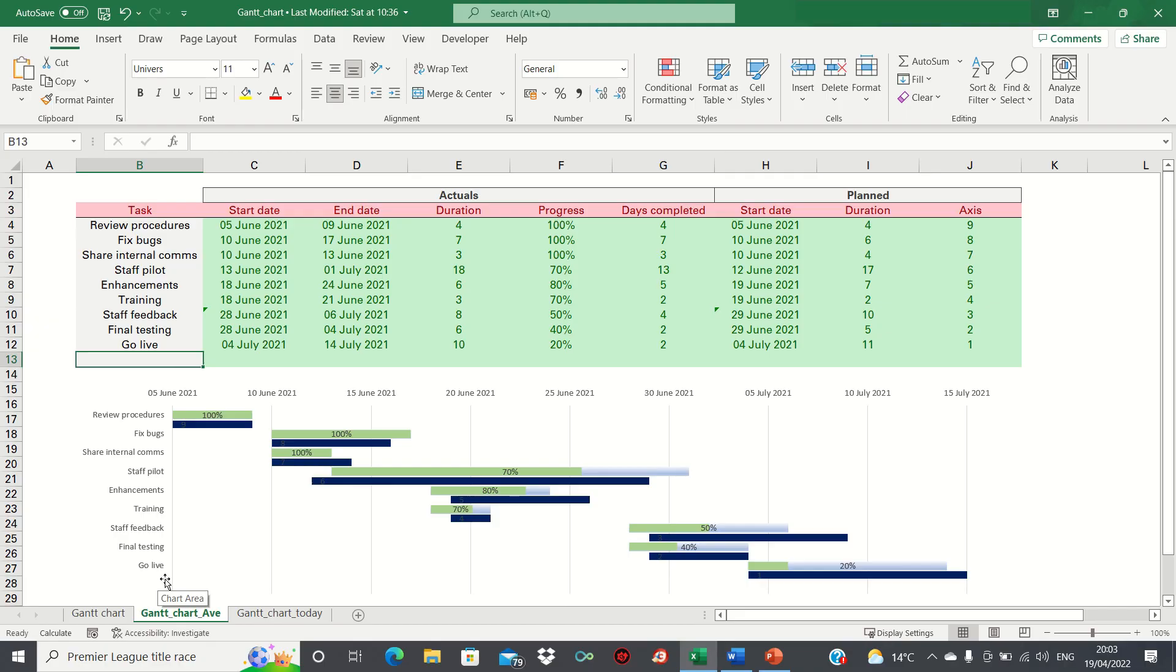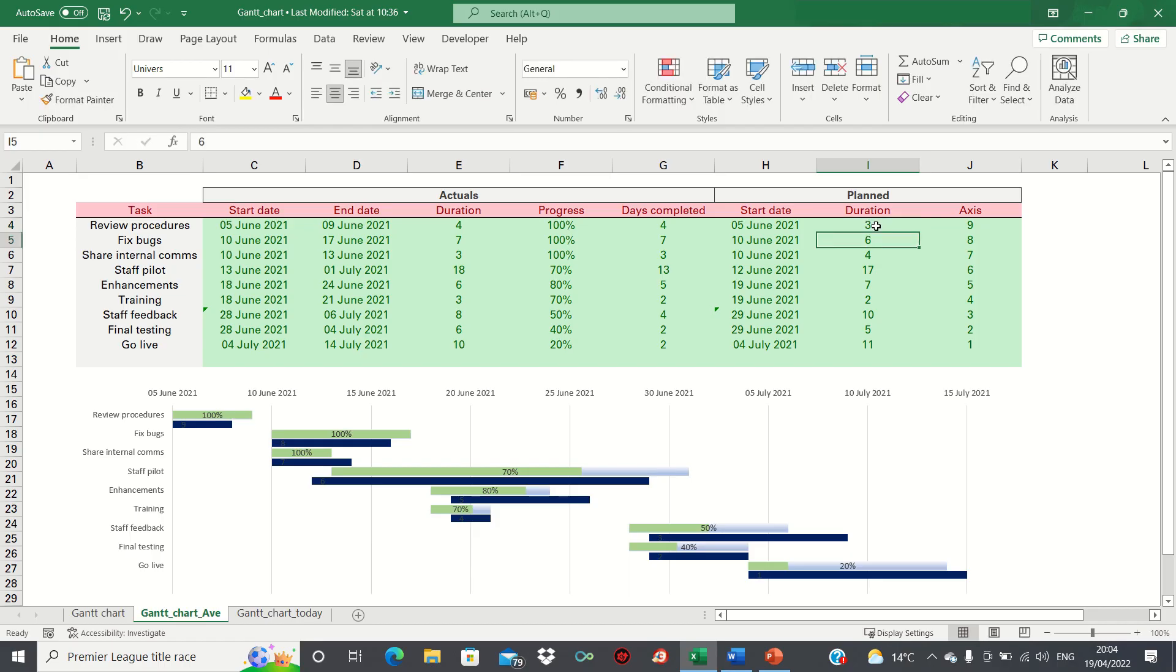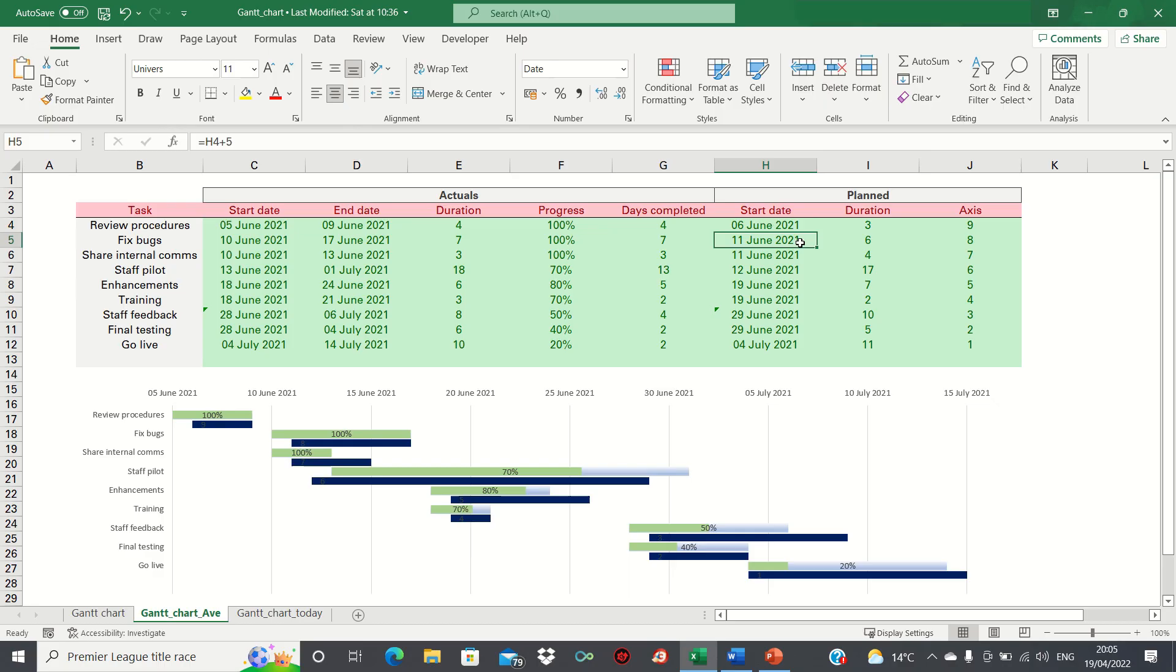Secondly, you may be wondering how the chart adjusts if we change the values in the table. Let's try it out. If we decrease the duration for one of the planned tasks, you can see that the bar changes as well. Equally, if we change the start date, this adjusts the first bar as well as the others as they're linked together via a formula.